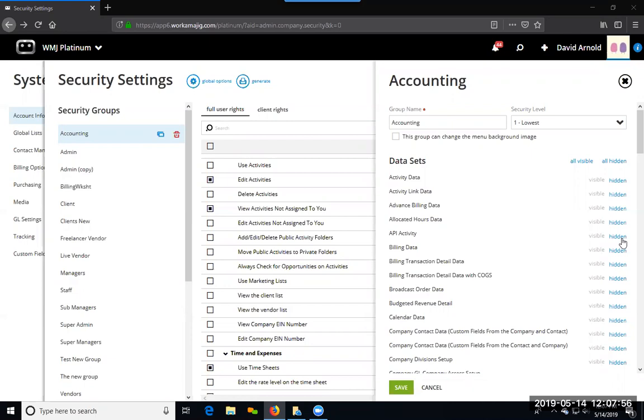It's linked to it, but when I apply a regular revenue invoice towards it, it's just applying it to the bulk. So advanced bills are always buckets, right? Even though I can see through the billing detail if it may have gone to a task, as far as it being open and I only applied a revenue from one targeted to that, that is not going to be possible to see. Okay, that makes sense?